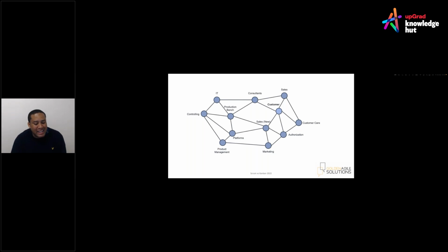So you would have heard me speak about lead time, cycle time. I didn't address this, but cumulative flow diagram. These are diagrams that show you how well we are doing in Kanban. And fortunately, you'd probably have to enroll on a Kanban course to get far more into the metrics and how they work. But lead time is all about how long it takes from the first point of commitment to potentially delivery. Cumulative flow diagram is like a burn down chart used in Scrum, but in Kanban you can see where there are any blockers and you can see the flow of work.